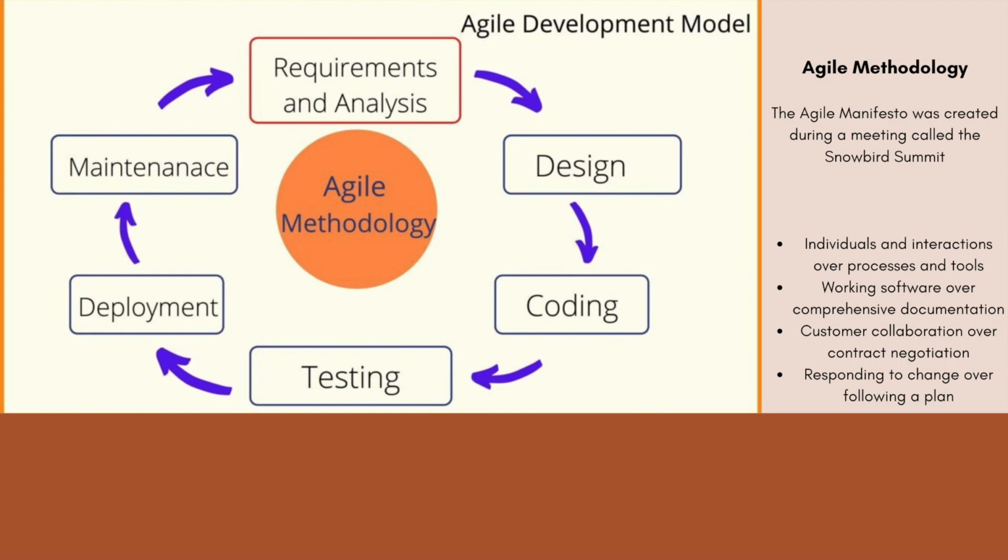Then it is about creating working software with proper documentation and all. So you will deliver the software in phases. Suppose you have to create a project in 10 weeks. You will divide it into small parts, maybe from 1 to 10, and we will agree with the client that we will be developing this incrementally. Suppose we have developed phase 1, then again we'll check with the client whether it is as per their expectations or whether it needs changes. We will gather the feedback once everything is done. If it is okay, then we'll move to phase 2.